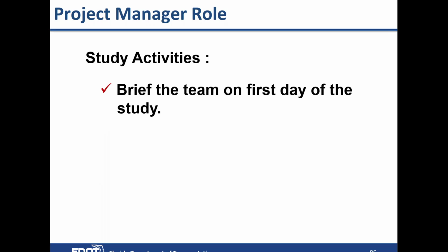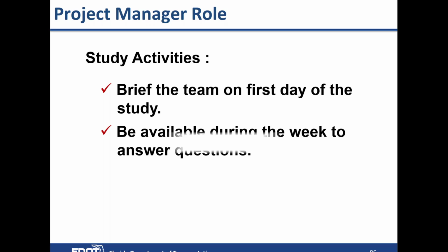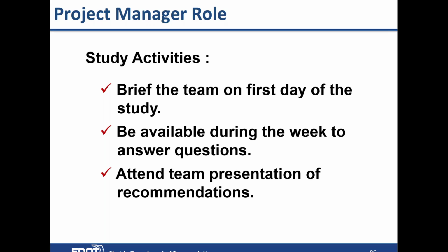During the study, the project manager should be available to brief the team the first day of the study, give a presentation on what the project is and what the main issues are, and answer any questions that the team may have at that point. They should be available during the week, that means by phone, for any questions that may come up after the briefing, and then attend the team presentation of the recommendations.